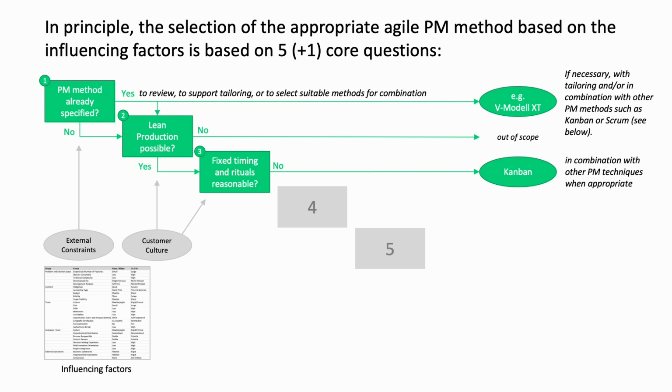Team size limits and team roles are not fixed by Kanban. Work is not strictly organized in fixed iterations, but rather seen as a continuous workflow. Keyword value stream orientation and strict rules and rituals are not prescribed either. Depending on where the organization stands, Kanban can often also be used in combination with other PM techniques, such as a distinctive risk management or similar.